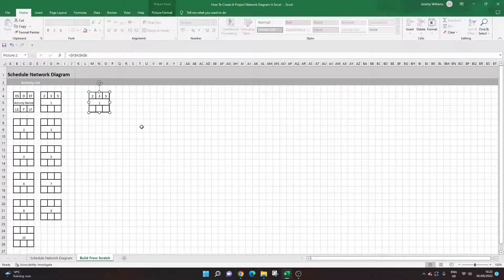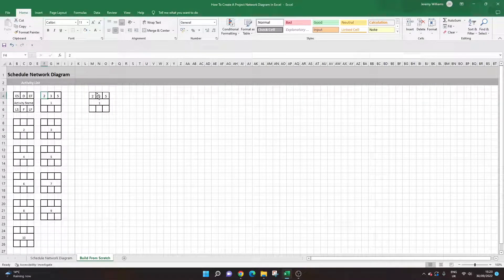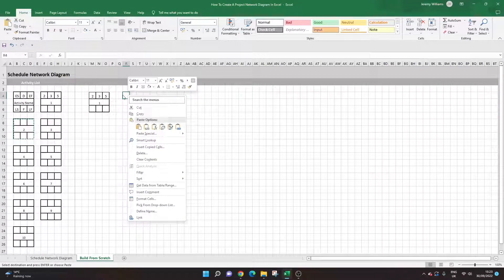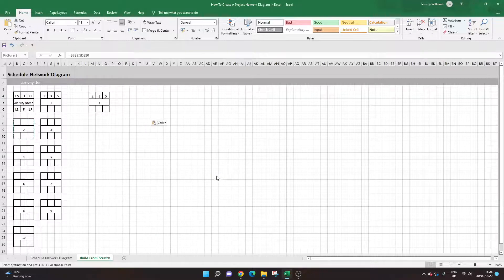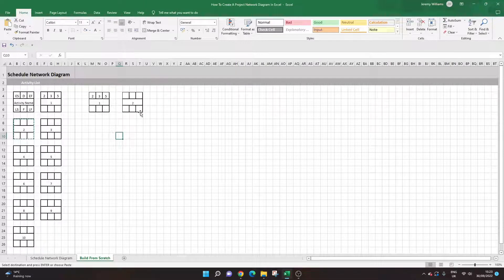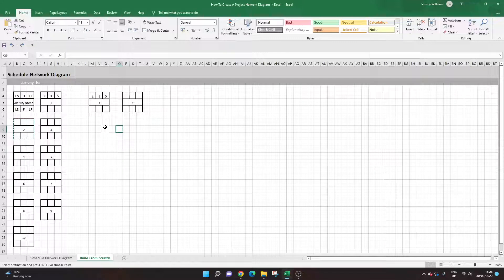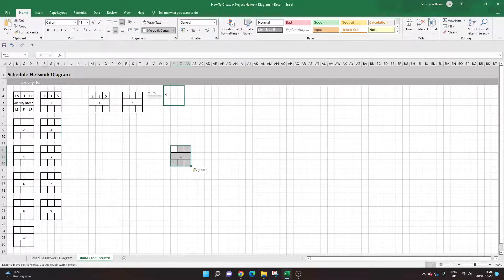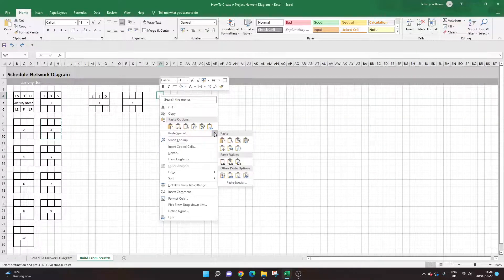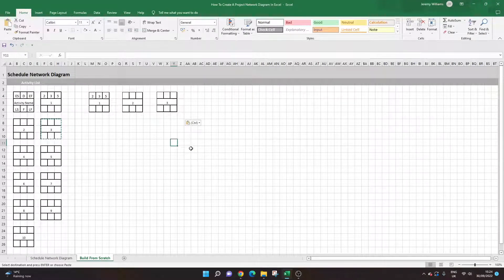Now Activity 1 is placed in the diagram. You can leave the early start, duration, and early finish labels in place. Continue copying the remaining activity nodes — select each one, Ctrl+C, then go to the diagram area and Paste Special as a Linked Picture. Use the grid lines to space them — about two cell-widths between each node works well. Position them according to your project's activity flow. Keep building until all your activities are placed.